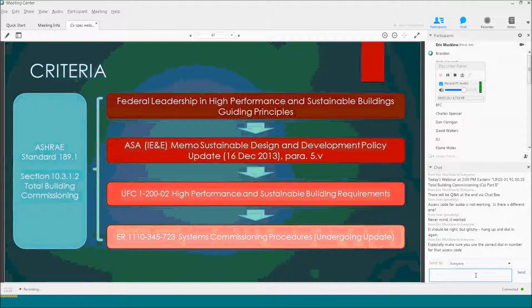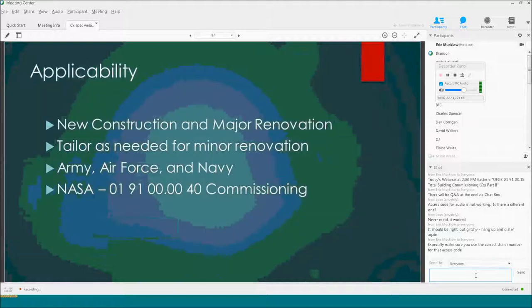Let me talk about applicability. The spec is really meant for new construction and major renovation. If you have a very minor renovation project, the spec is probably going to be quite a bit of overkill. If you have questions about that, feel free to contact me for recommendations. It applies to Army, Air Force, and Navy.